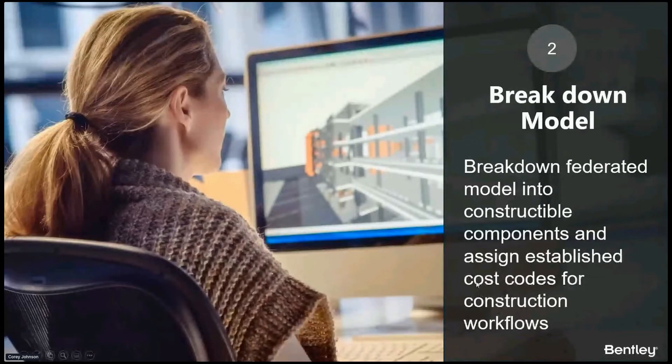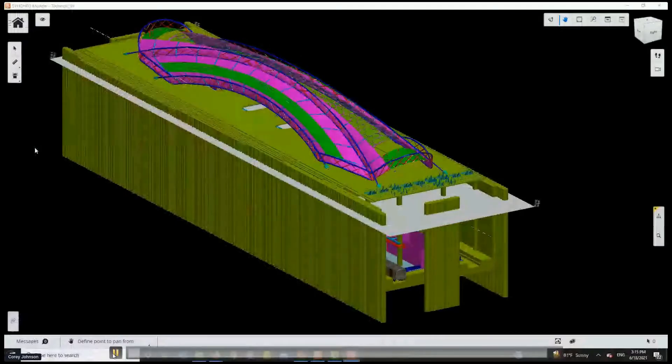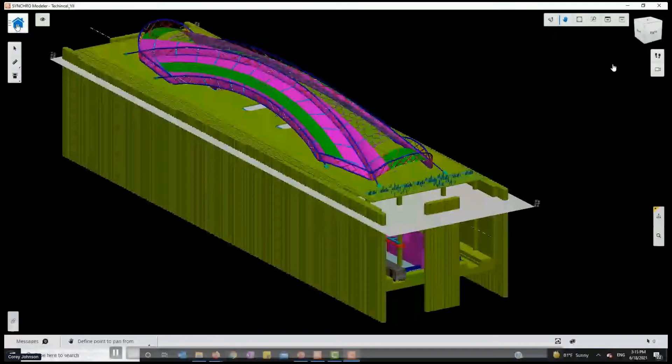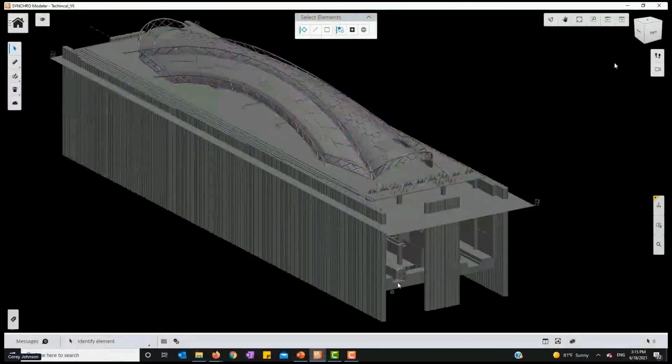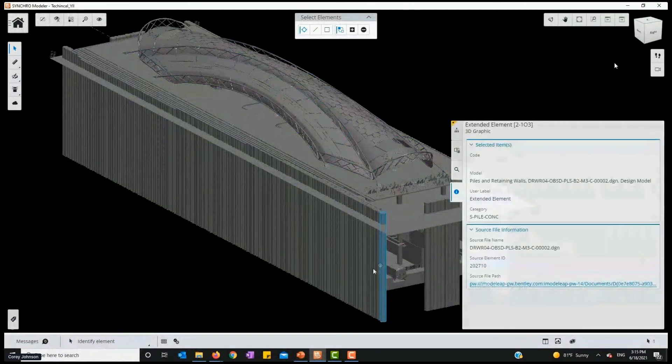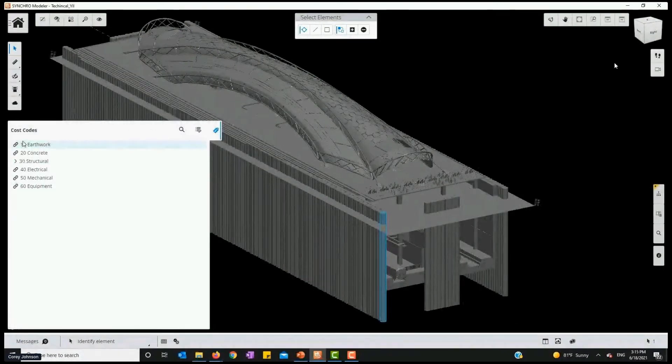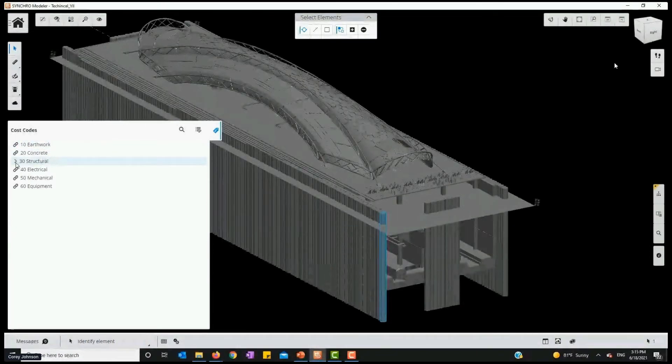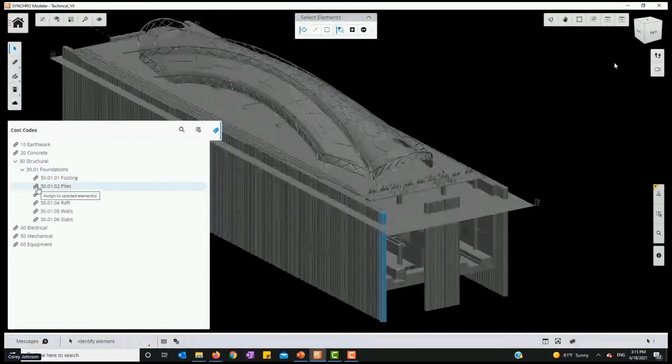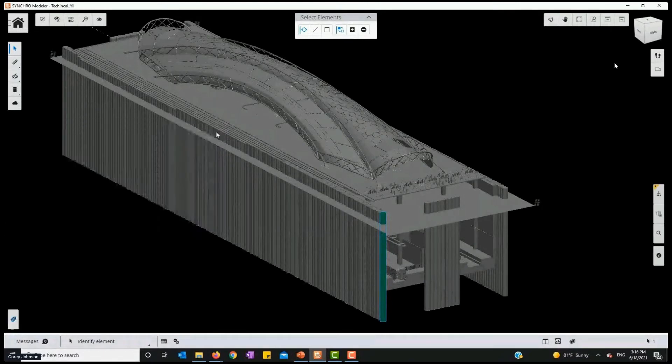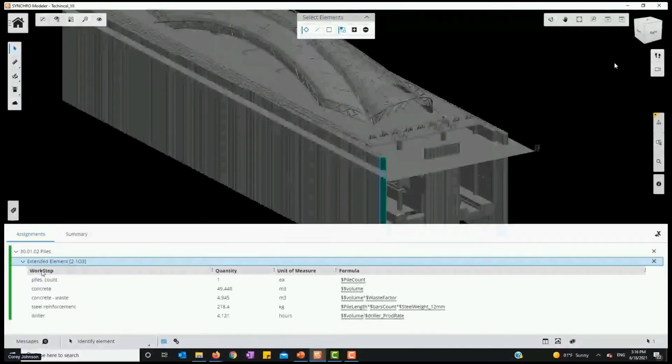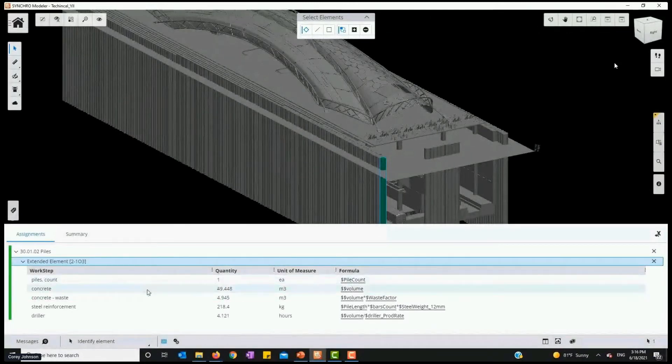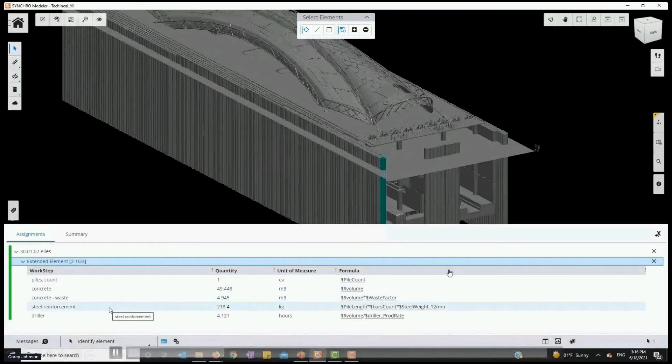So what happens when I can apply that to that nice model? Then I get something valuable. So what we're going to see here is in this project we got a bunch of piles, and we're going to do this - what we call quantity takeoff view. And what we want to do is we want to read the engineering information. So we got a pile here - not a lot of great information, but there's good information here. We're going to come in - and this is our construction side - I can assign my own company's cost code structure to engineering modeling elements. So here we're going to say I want to assign this pile cost code A 30-01-02. Now when we link this in, that thing's going to go green. Green is good - I've got a cost code assigned. And here we can see our report. So not only do we get the fact that it's in each, it's a single pile, but we also know how much concrete's there. We put in a factor for waste.